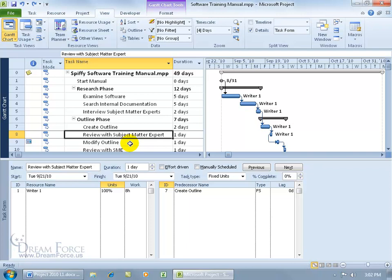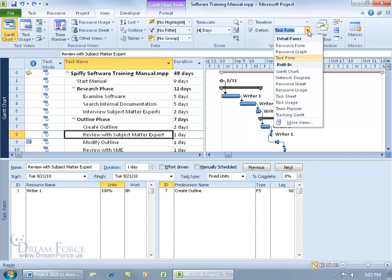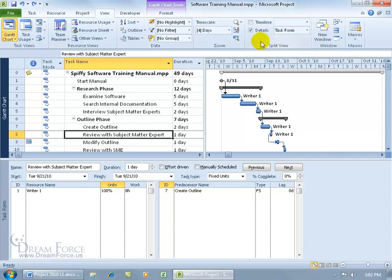As you recall in the previous training video, we learned how to assign resources to our tasks. One way was to do it in the task form. If you don't have it up, come to the view tab, go to the split view group, check details, and it should say task form. Within the task form, there are three time fields: the duration, the units, and the work.